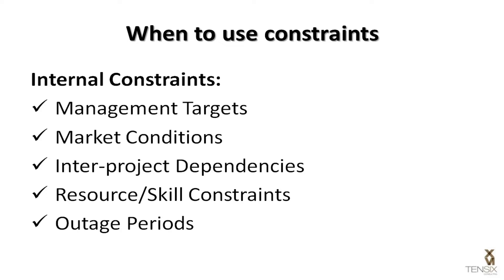Outage periods are common constraints found within electrical utility companies. A lot of project schedules can be affected by or dependent upon outage periods when parts of the electrical grid are powered down for repairs. These events frequently feature as hard constraints in many utility company project schedules.